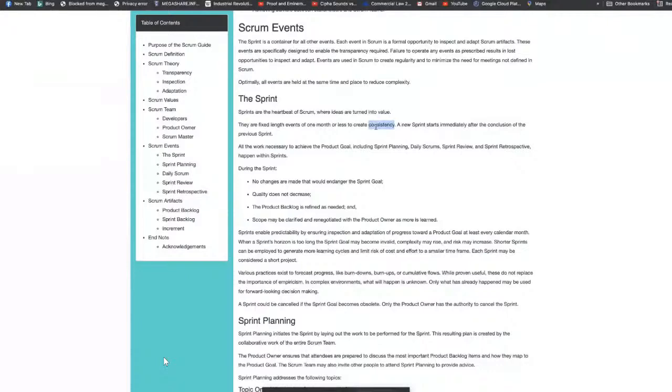things like what we call estimations of work hours. That is to say that your requirements in a sprint, you will actually need to estimate based on the fact that developers come together and determine how many hours it will take them to accomplish a particular task. And then all of this is put together, right? To know that within this week, 2 weeks, or a month sprint, we'll be able to do an amount of hours of, say, 30. That 30 hours, take an amount of tasks you can do that can cover the 30 hours. Because at the end of the day, you need to deliver value.